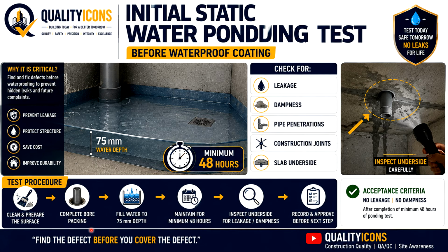Clean, prepare surface, complete bore packing, fill water depth to 75 depth, maintain minimum 48 hours. Inspect underside for leakage and dampness. Record and approve before next step.